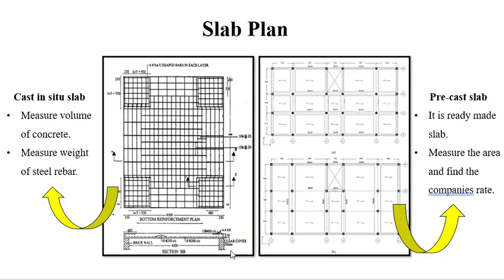Okay, how much concrete, how much cement, how much sand, how much steel, not my concern. They will tell me, okay, you need a 400 square meter slab. My payment is 1000 BD per square meter. Clear? Okay. So you can see, because of the construction method, your pricing system is changing now.